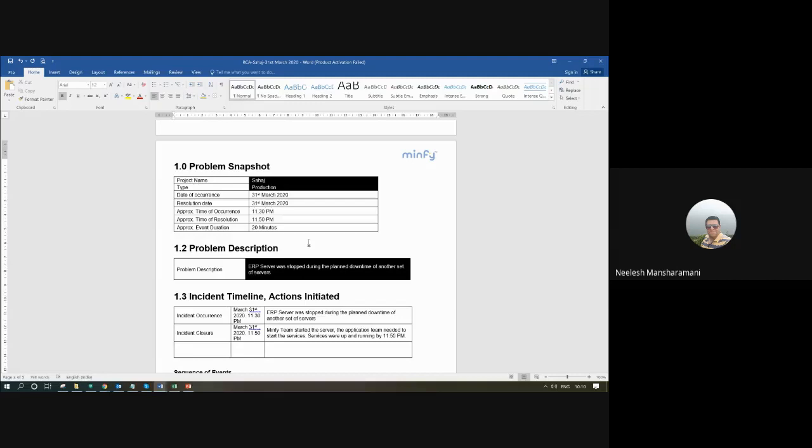Any enterprise level customers will expect that whenever we are going to perform a change, we send an email 3 days back, then another email one day back, then another email before starting the change. And during the implementation of the change, even then you have to send communication that okay, this server is now up, I'm going to proceed further with the next server. That server is done, I'm going to perform the change on the next server. So all that communication has to go without fail. That will ensure that most of the problems get resolved automatically. The customer might say, okay, don't do it, please wait. Okay, the impact is less.